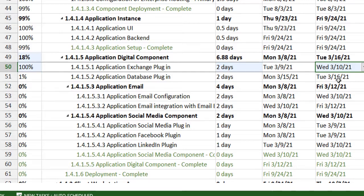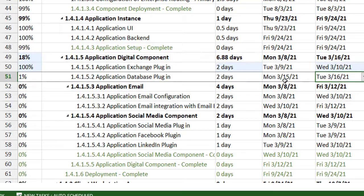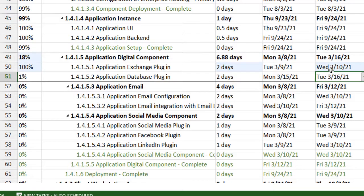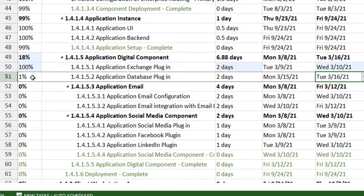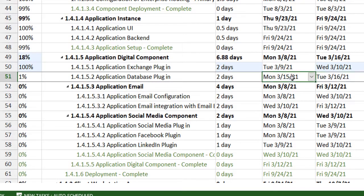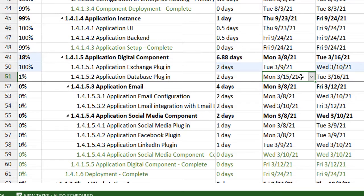Now, what should have happened is that task number 51 should have moved earlier as well because it's dependent directly after the completion of task 50. However, since I have a percentage set to this task, my project plan does not move the start date. It assumes that since some percentage, anything above zero is set to a task, it will fix its start date with the understanding that this task has already begun. So it's not going to change.